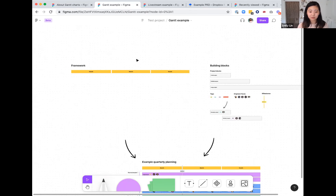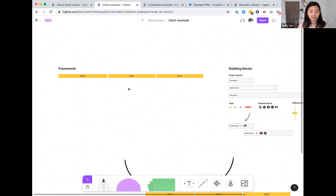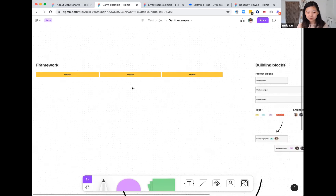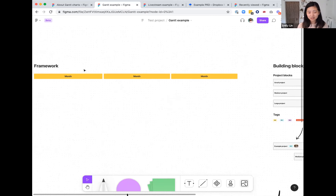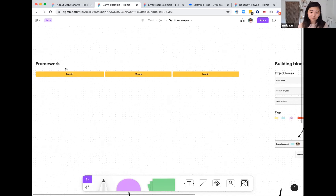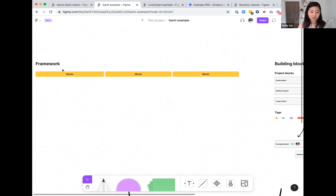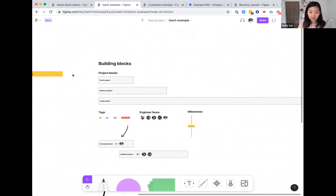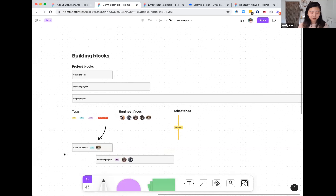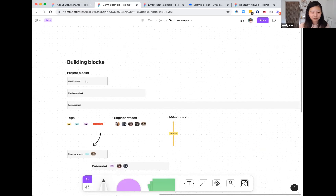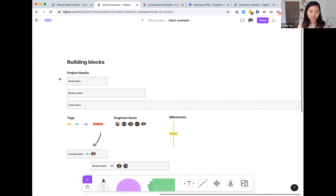I'll show an example of how I build out roadmaps. Usually I do this collaboratively with cross-functional leads like the engineering manager, design lead, and whoever else is relevant. You can start with something like this, where you have a timeline on top. This example is set up for quarterly planning, but you can put six blocks for half a year or twelve for a whole year — whatever time scale you want. It's actually really helpful to come in having talked with your team about rough t-shirt sizing for the candidate projects.